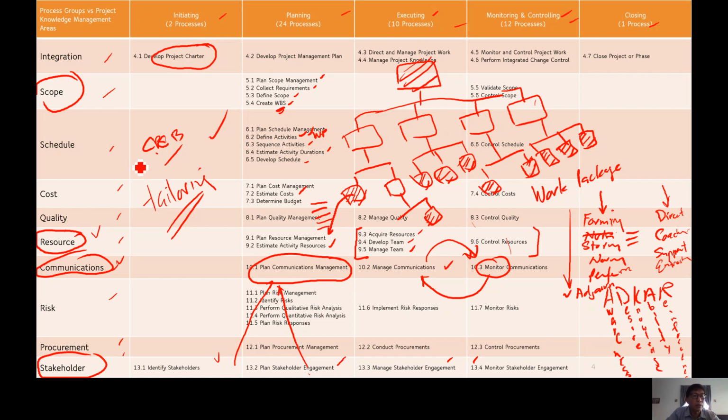So we get our schedule, we have spoken about it. And once we've got a schedule, we know the timing, and once we've got the timing, we know how many resources we need to have, right? The number of resources, because we get it from here. That's under resource, because we have covered that under people already. We know the resources, both physical and human resources. Then we know for how long we're going to use those resources. If they're contract staff, we know how long we need them, our budget for their resources.